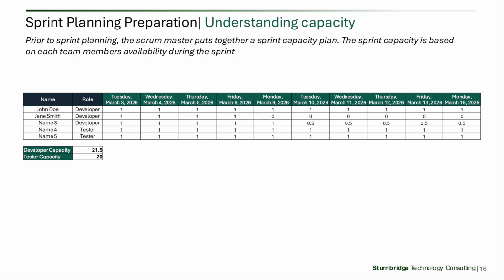When the Scrum Master or team prepares capacity before planning, the sprint conversation becomes much more grounded. Rather than asking, "How much do we want to get done?" the team asks, "Given our real availability, what can we finish at a quality level we can stand behind?"